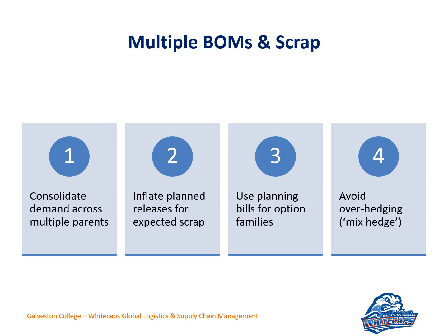And if we started seeing 10%, 10%, 10%, on multiple days, we would have to go back and adjust and say, is our forecast adjusting for what we're going to need over the next few weeks? So we don't get to a point where that extra 3% a day eventually consumes all the material on hand before new material comes in. We've seen that happen a few times where the outliers are higher than planned or expected.